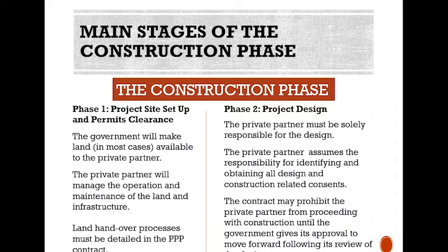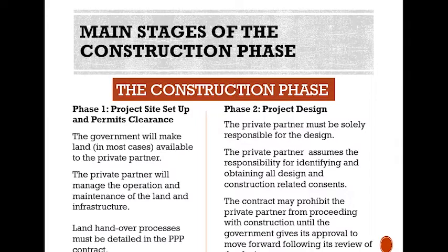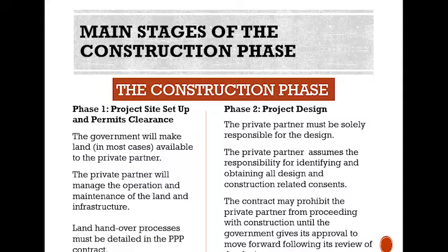Main stages of the construction phase. Phase one: project site setup and permits clearance. The government will make land available to the private partner, who will manage the operation and maintenance of the land and infrastructure. Land handover processes must be detailed in the PPP contract. Phase two: project design. The private partner must be solely responsible for the design and assumes the responsibility for identifying and obtaining all design and construction-related consents. The contract may prohibit the private partner from proceeding with construction until the government gives its approval following its review of the design.